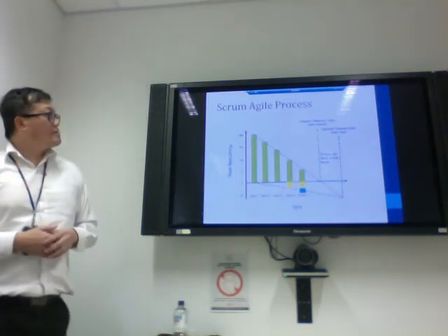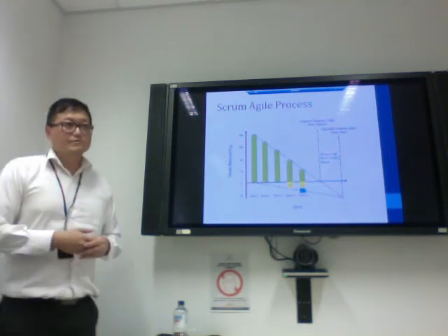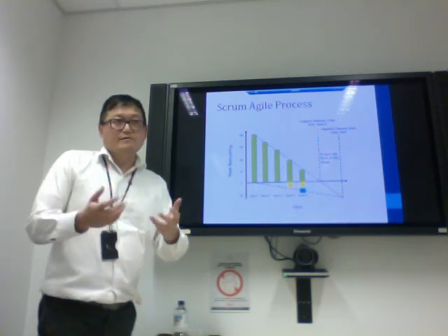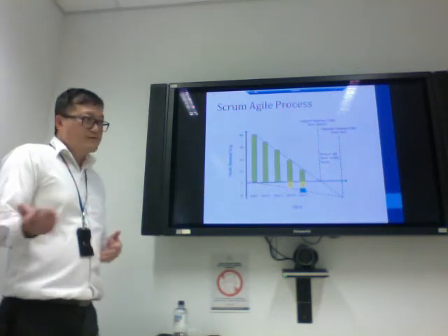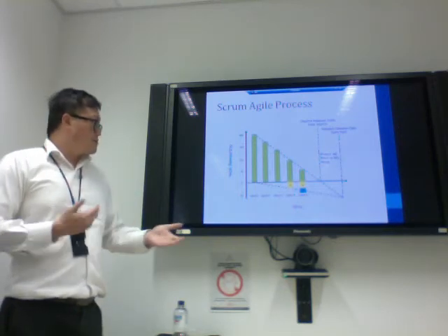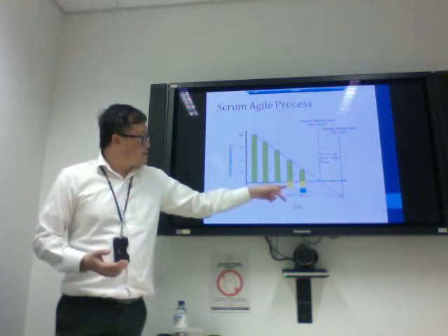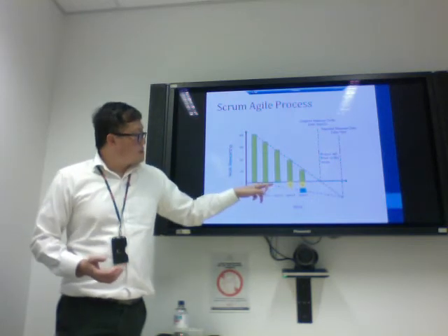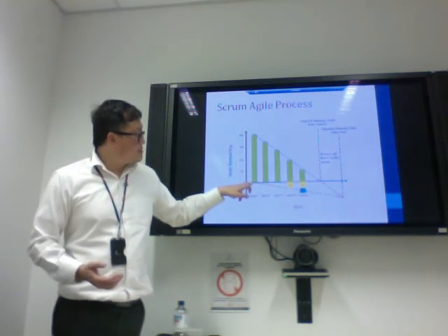And in the Scrum Agile process, there could be variations that come into the scope of work. Maybe we have a bug that we didn't anticipate at the beginning, so the scope would have blown up. Or there's an extra requirement that came in from the stakeholders or the product owner, and the scope would have blown up. These can be reflected in this burn down chart below the zero line. The impact of this additional work on the deadline, we can see by extrapolating.